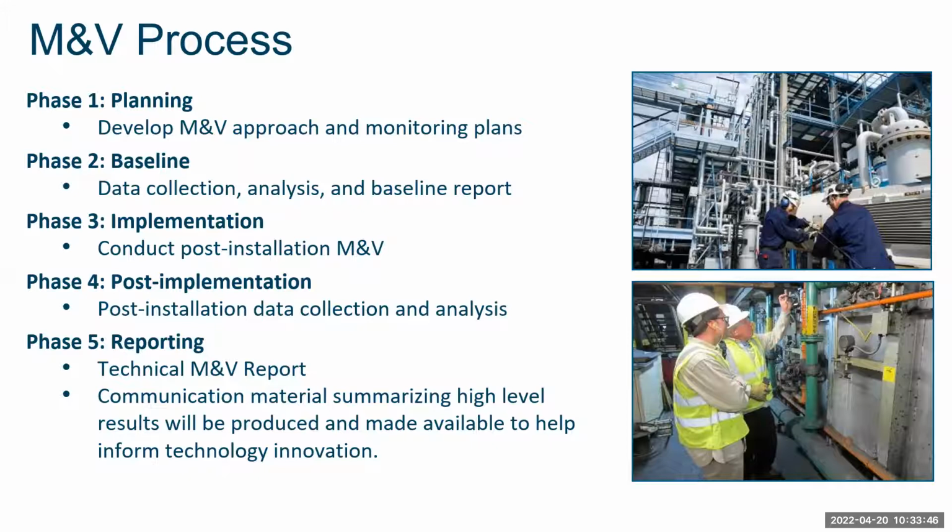Phase 2 is where we characterize what the existing system or equipment is doing in order to understand the current energy or water or waste usage. Again, it's data collection followed by analysis, and then we generate a baseline report that essentially characterizes what the site currently has.